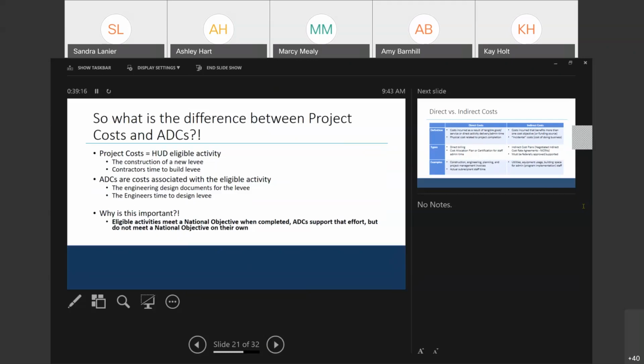So it says, so to clarify, if a regional planning commission is included as a sub-applicant, their activity delivery costs are only reimbursable at cost. That is correct. That is correct for the UGLG if they are building costs in for staff that are delivering the activity above and beyond what their normal capacity is. It's also true for anything that may have to be purchased to deliver the activity, depending on who would purchase that, how that's determined through contracts. So yes, that is correct. If an RPC or a council of governments is included as a sub-applicant, their activity delivery cost is only reimbursable at cost.